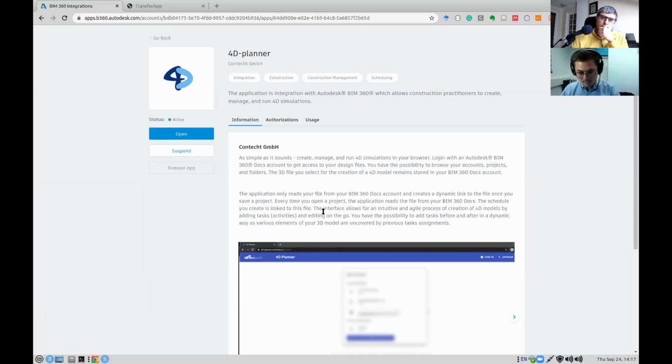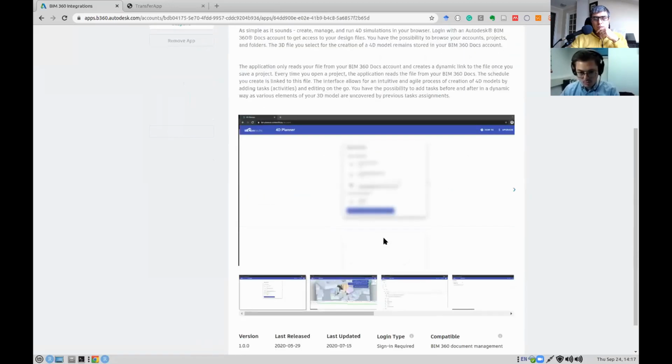So that's what we call the time clash, because the order of activities is not following the logical one. It happens because all these models, including the schedule, which we can see like a time model, were created in isolation. So you can bring them together, start doing coordination in this direction, and align the construction work.